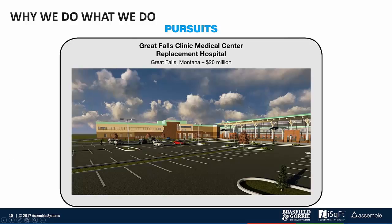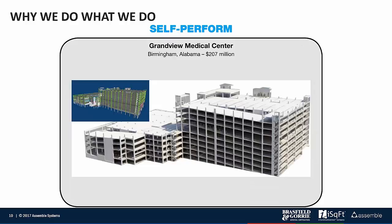Another area we like to focus on is our self-perform group, and most of our self-perform work is related to our concrete work. From a VDC standpoint, we like to be involved from the beginning of pre-construction efforts all the way through the as-built information. The Grandview project was a medical office building, hospital renovation, and parking deck combo where we modeled the concrete and filled our estimate from it using Assemble. We are not only generating quantities, but also using the model for visuals of PSI strengths, utilizing the models to understand lift and pour sequencing, determine formwork systems, discuss crew size analysis, and perform constructability reviews. We really try to get our project managers, superintendents, and field engineers involved in this process as early as possible.